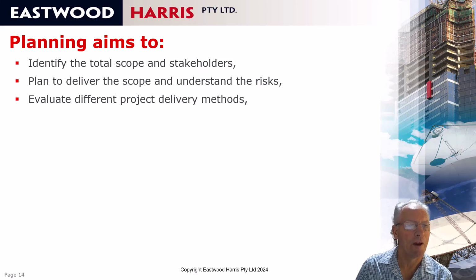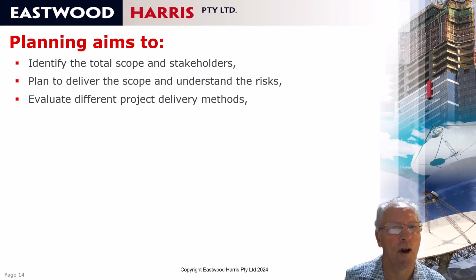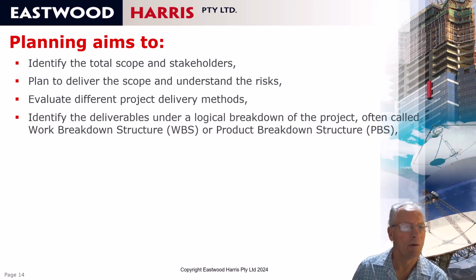You may need to evaluate different project delivery methods. So for example, you might have an option of cast in situ or precast concrete, and this may require the development of multiple programs. You need to identify the deliverables under a logical breakdown of the project. It's often called a work breakdown structure, or WBS. This is a term used by the PMBOK, or product breakdown structure, or PBS, which is what Prince2 uses.